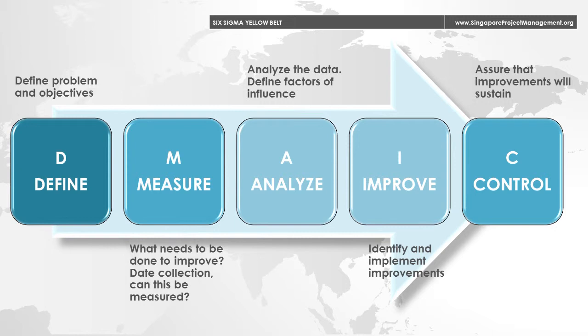The last step of DMAIC is to control, to make sure that there are no deviations from the target. This would mean setting up pilot runs and mechanisms to monitor all processes.